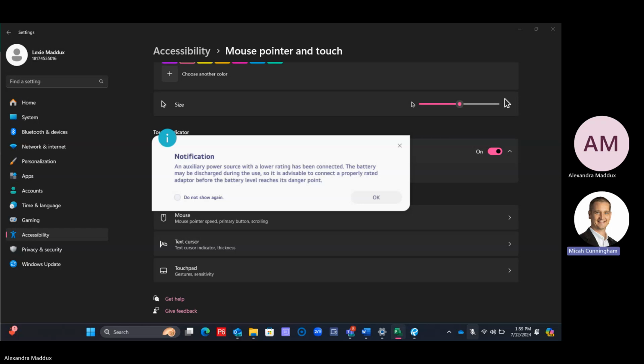Yeah, so if you had just the grade work and you copied and pasted the grade work, you're going to also carry over the tie from Cure Slab to structure in the other building. So you'd have to delete that. But you can just collapse one section, right click and copy, and then right click and paste that whole section, or you can collapse your whole building and do the whole building. Does that answer your question? Okay. So I'm going to delete the second building.